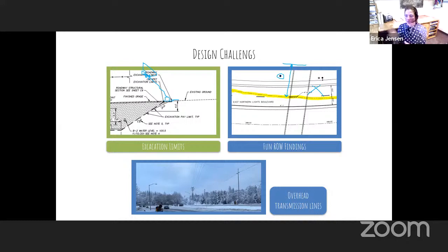So MOA was able to do some internal agreements for access for construction to allow legal access into this parcel up here. And then afterwards, once those temporary ones were allocated and granted for legal access, then they could make it official.